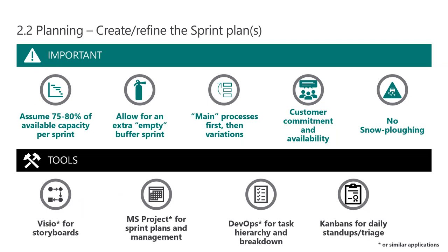So you can keep your dates for start of user acceptance testing, for user training, for go live, and so on. So you create that buffer, allows you to absorb those changes, and you don't whiplash the rest of the project, right? You allow the committed dates to stand because you're absorbing the unknowns within that buffer sprint.